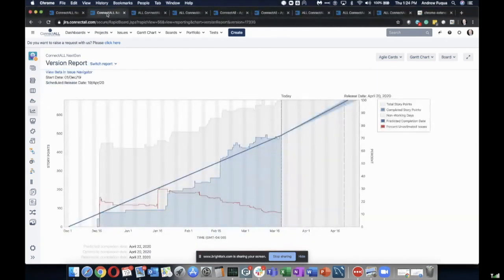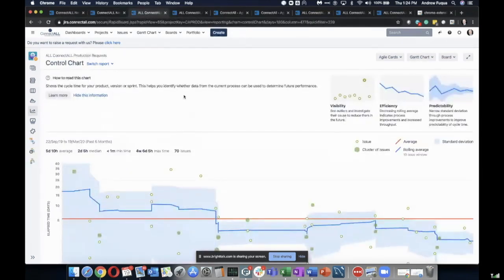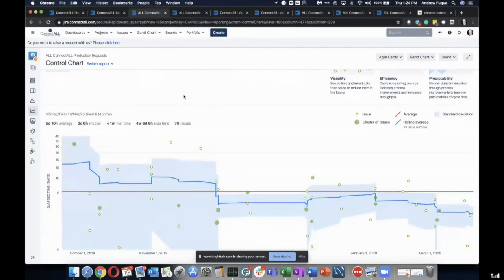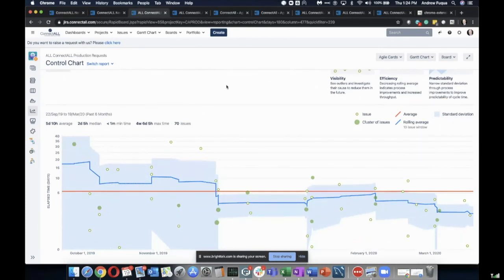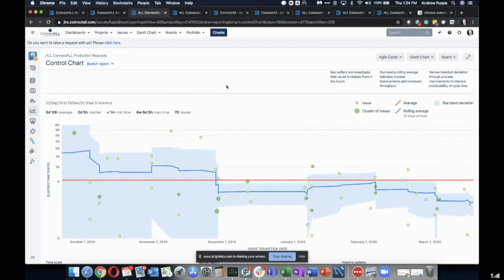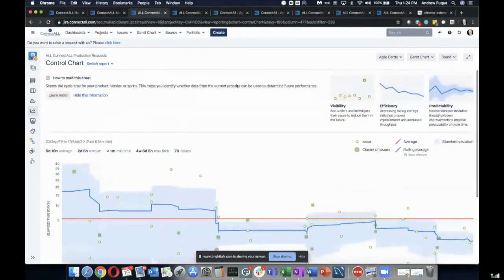I'll show you just a couple more by way of example, in case you haven't looked into all the things Jira has available. This version report is very useful. And I'll also show you this control chart — it might take a little head-scratching at first, but once you learn to read it, you can get cycle time for your wait states, your delay, your value-added states, and the overall lead time from customer request to delivery.